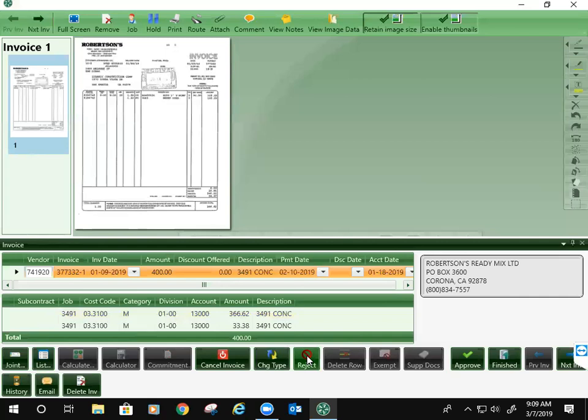So what you'll need to do is you don't reject that invoice back to accounting. What you're going to have to do is get your change order, get it approved, get that change order to accounting, we'll input it into Timberline, then you can go back into Timberscan and allocate to that change order amount. If you don't want to do the change order, then what you'll have to do is revise the amount of the subcontract billing. You'll approve it for a lower amount or a different amount. But don't reject it because you need a change order, because then it's just going to go back to accounting, who's going to have to still wait for your change order, and then they're going to send it back to you.